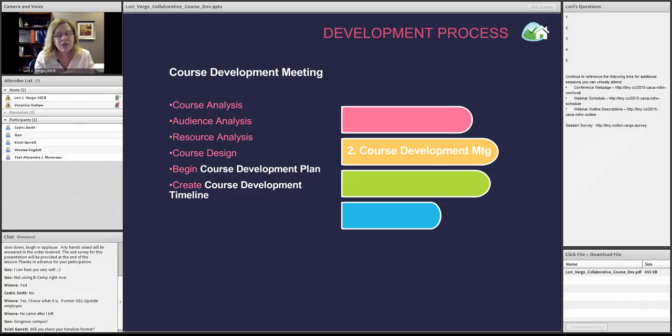The reason why there are only 2 modules in phase 1 is I go over those with a very heavy hand, as you'll see when we get on to Basecamp. I put in a lot of track changes, a lot of comments to help them think about their pedagogy, to think about what they want students to do, and how those all build up to the objectives for the module. I have found that after they have 2 really good modules done, the rest of the process is going to flow a lot easier because now they understand by doing what the Quality Matters rubric is.